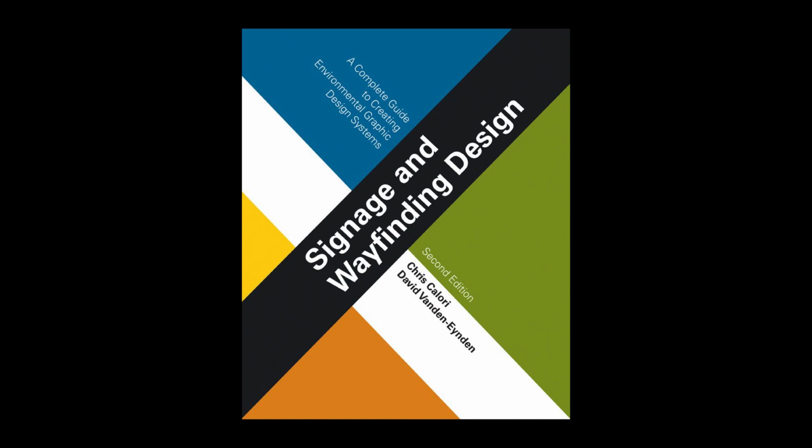Other items that may or may not be reviewed with the client include study and/or presentation models, 3D computer renderings, and full-size mock-ups. Depending upon the project's requirements, the EG designer might make a formal presentation during or at the end of Phase 3, or may just submit a progress set of the location plans, message schedule, and design drawings for the client's review.